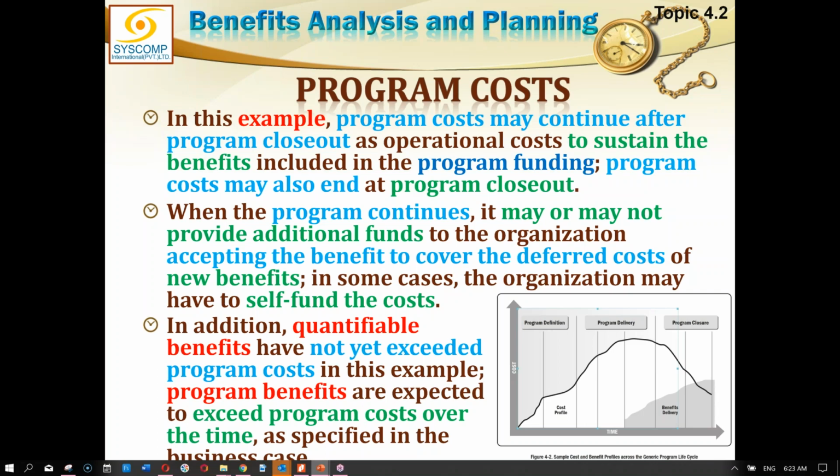Sustainment means that I have handed you over a system, and now I am spending some time with you to teach you how to run the system. Sustainment is that period. After you are adept at doing that job, I will withdraw and you will continue doing your job. So I am smoothly handing it over to you and teaching you how to sustain.